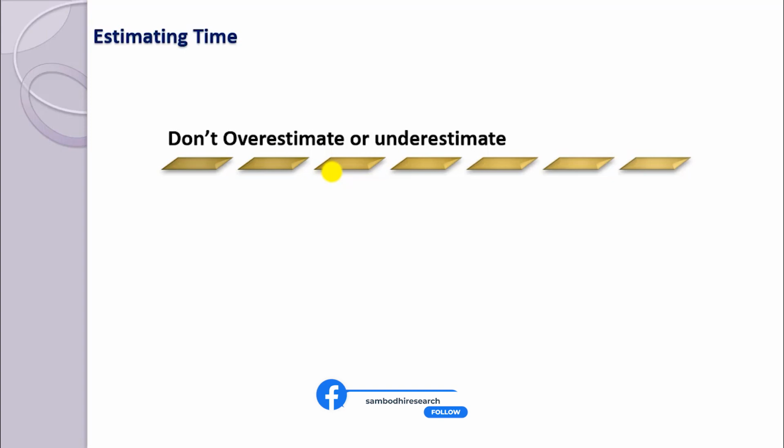Then you have to do it for one particular module, build it in phases, and then estimate, because in such cases the requirement from the client keeps on changing. So it is important to give an estimate for a small part. If they ask for a big part, it's not possible. Even though the client pressurizes you for a big project estimation, it's not going to help you.